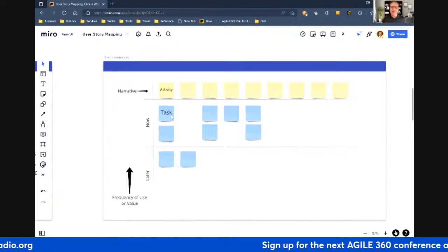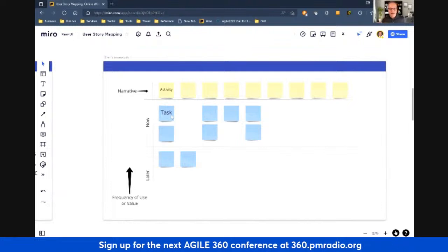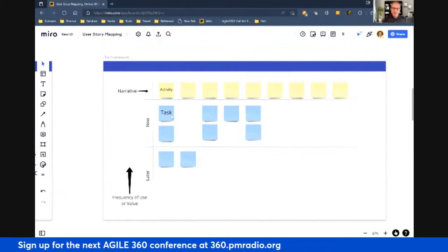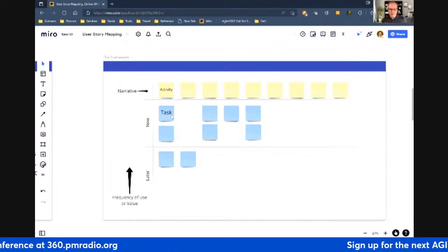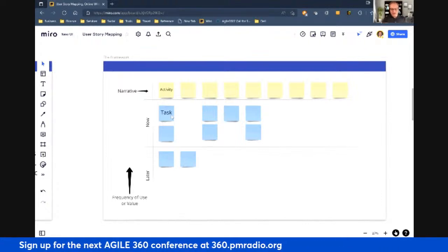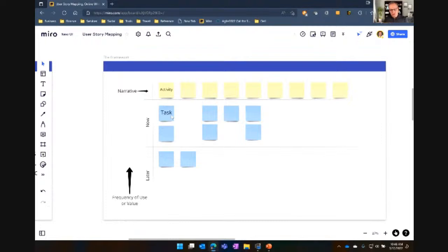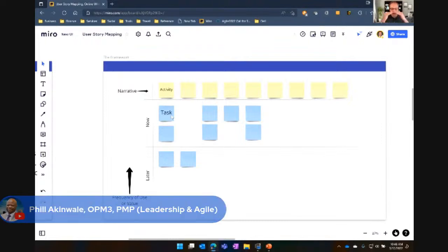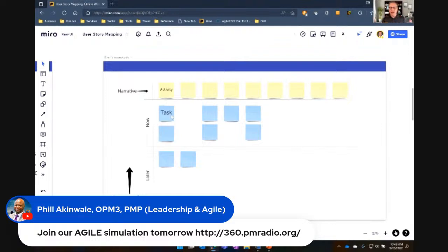It enables the heating element. It verifies that there's water. Blink the light if there is no water, right? Get prepared for when the user is going to push the button to get the coffee, right? So the individual things that need to be implemented to enable turning on the machine, right? You get the idea. Now, the other thing you're doing is as you're coming up with these user stories related to the steps that a user is going through, you're also moving them up or down depending on a couple of different factors. So it could be frequency of use, right?